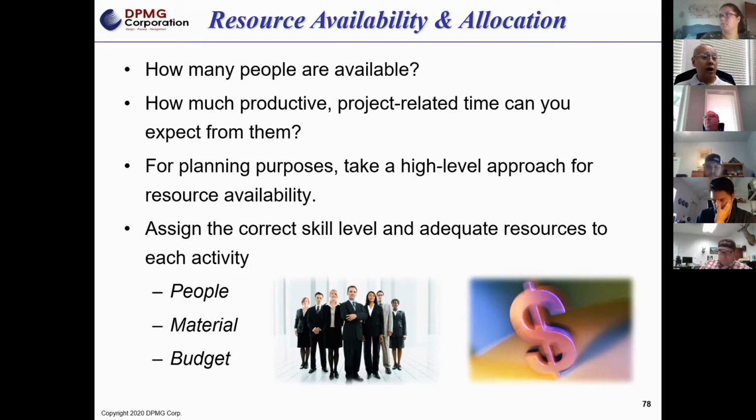Now, there may be a dollar difference, but anytime the time gets extended, I've impacted things downstream. The information coming from that resource for that next step is delayed, which means it affects everything downstream. So we need to understand what skill level we need. What we actually end up using may be different, but then we need to understand what the impact to the time schedule is when you do that. It may be at lower cost, but if we just delayed the project, that's not a good thing. It's probably going to cost us more in the long run. So these are things you need to keep in mind as we go through and identify the skills.